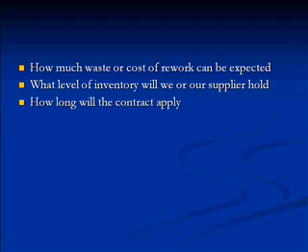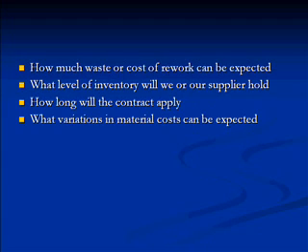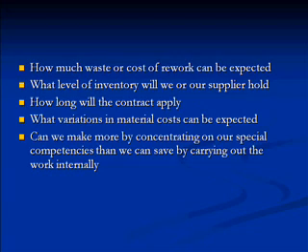So you need to consider other points also, like how much waste or cost of rework can be expected. What level of inventory will we or our supplier hold? How long will the contract apply? What variation in material cost can be expected? Can we make more by concentrating on our special competencies than we save by carrying out the work internally?